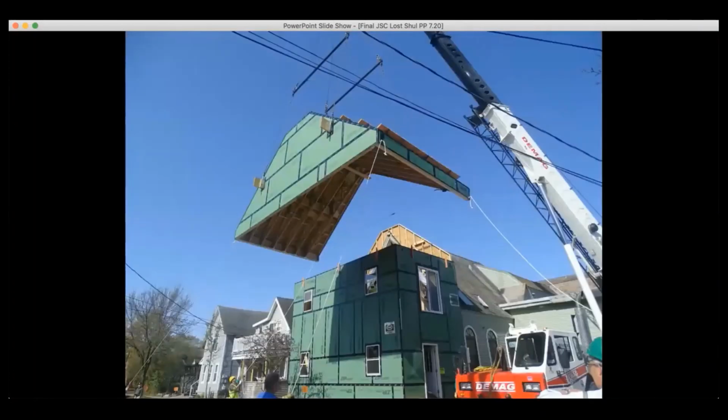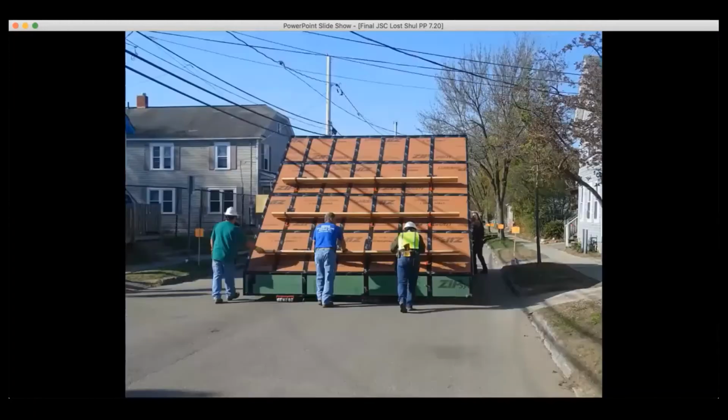After over 9 months of preparation, moving day, May 6, 2015, dawned bright, warm, and sunny. It was estimated that the move could take up to 11 hours, so the crane was placed by 8 a.m., and lifted off the roof of the protective structure a half hour later. The roof was settled on rollers and pushed down the street and out of the way.